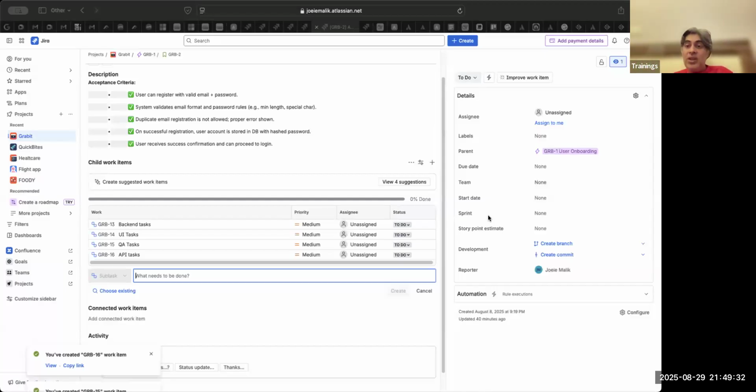But let us say all of you are saying 5 points, but maybe Kiran is still not agreeing. He says, no, I have to implement a hash algorithm. It is a more complicated effort. So after the first round of discussion and first round of estimation, you again have a discussion, then a second round of estimation. In the second round, after clarifications, Kiran is still saying, no, it is an 8-pointer. So we ask Kiran, boss, why?